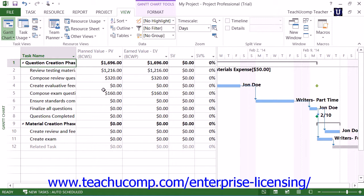Remember that these values are all set as of the selected status date for the project file. You can change that date in the Project Information dialog box to change the numbers shown in this view. In this view, you'll see the Planned Value, which is the budgeted cost of the work scheduled as of the status date, and the Earned Value, which is the budgeted cost of the work performed as of the status date.